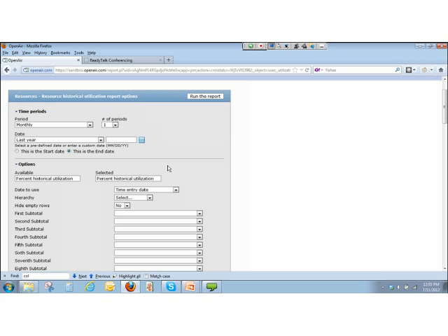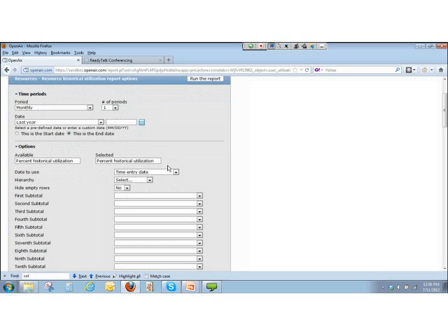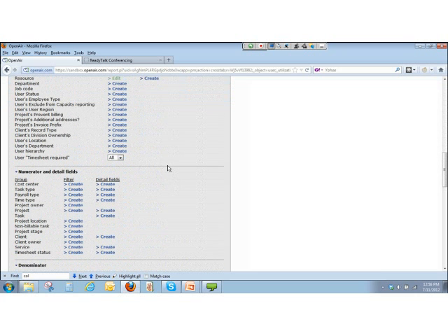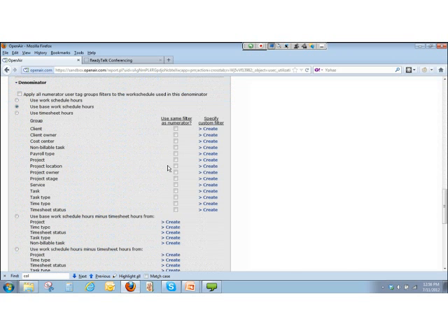So here I'm going to say that I'm just going to go across an entire month. I'm going to look at an entire month. I'm going to adjust the cost for all the hours in that month according to the number of hours people worked and normalize it back to a normal work schedule, a full work schedule. 40 hours a week is what my work schedule is. Things that you can also consider in this report are what contributes to utilization, and we'll talk about that in just a second. Like what do you count as an hour worked so that you would normalize correctly?